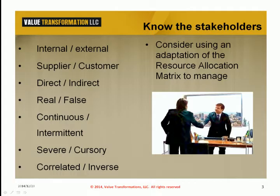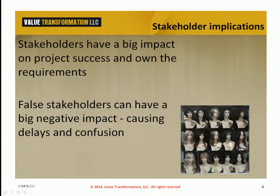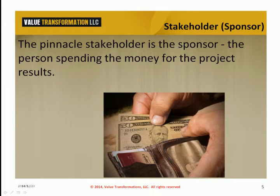Experience indicates these sorts of tussles often impact the amount of testing time available. While these squabbles stall a project for a decision, the time ticks down on the work to be performed. All that are associated with a project are stakeholders, and this includes the project participants. The further we move away from the project and the expected results, the more distant the influence. Society at large is also a stakeholder, as the results will likely move throughout society. This also includes governmental entities from the perspective of regulation. The pinnacle stakeholder is the person spending the money for the project, often referred to as the sponsor.